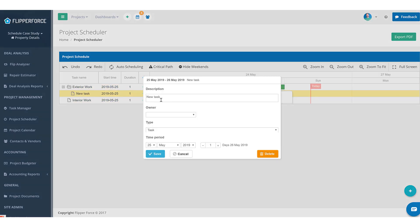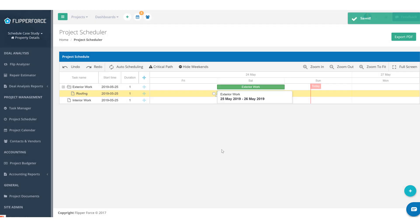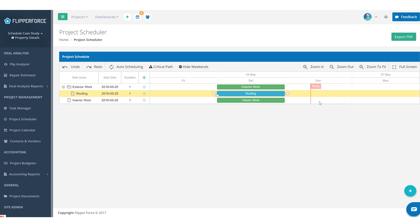Let me add in our first task, which is going to be roofing. Generally, roofing is the first thing you want to do on a project — to make sure you get the property dried in. If you have a leaking roof, you want to get that fixed up front so you're not leaking over your new drywall, painting, and flooring. Roofing can generally be completed in about one to two days for a 1500 square foot property. An asphalt shingle roof should get done in one to two days.